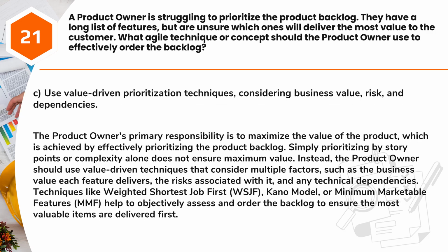Answer: C. Use value-driven prioritization techniques, considering business value, risk, and dependencies. The product owner's primary responsibility is to maximize the value of the product, which is achieved by effectively prioritizing the product backlog. Simply prioritizing by story points or complexity alone does not ensure maximum value.